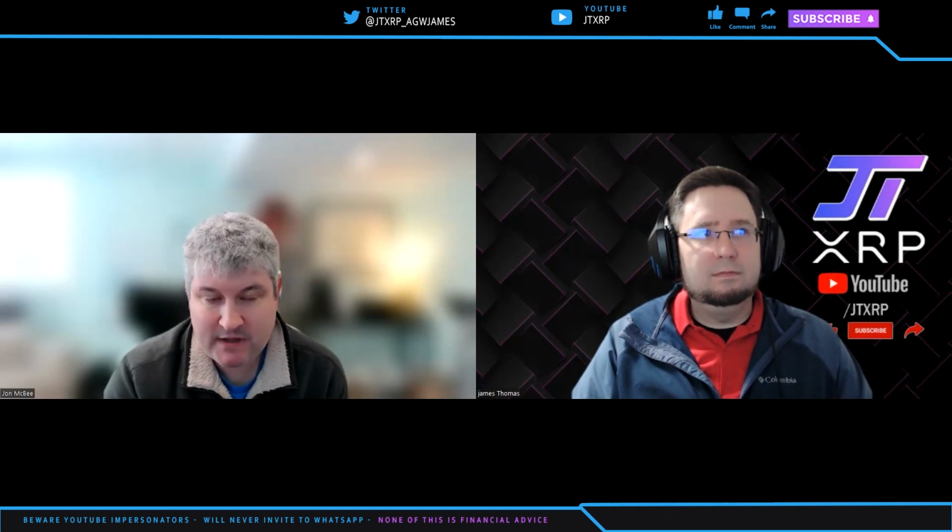And so we'll have an idea for a new product. I will work to put together a proposal for what I think we should build. We bring it to the DAO, the foundation's a DAO, and we vote on it. If we decide that this project or product will add value to the network, I'll go find an integration team. We have a couple all around the world that we work with, and have them quote it for me. We'll get the quotes back and pick the one we want to work with, and then we'll just run sprints to execute on that vision.